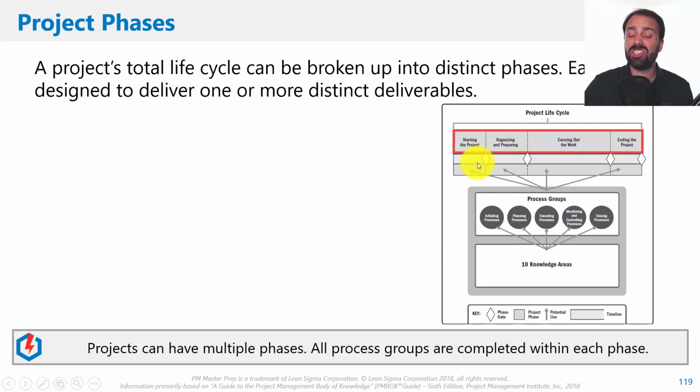And then within each phase, you go through the same initiating through closing. So let's think about this. You could go through the first one and say, hey, we have to initiate the project, work the project, monitor, and then close. And then boom, you're back to the same thing. Hey, we have to initiate the next phase. So you need to understand that dynamic as it rolls down.